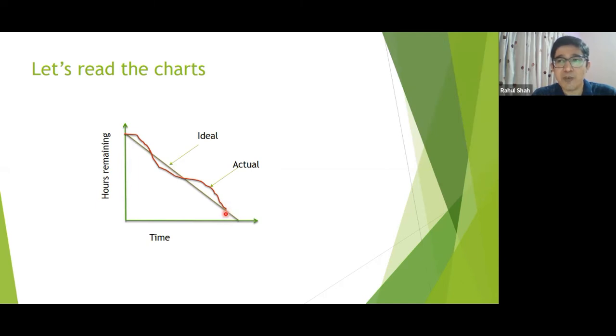So this shows that we are at the second last day of the sprint. This chart also tells me what day the team is right now in their sprint. They have completed around 80-90% of the sprint time, and just 10% or 15% is remaining. That is also telling me, if this red line is here, I will say that okay, they are not going to achieve, because this one is not possible.